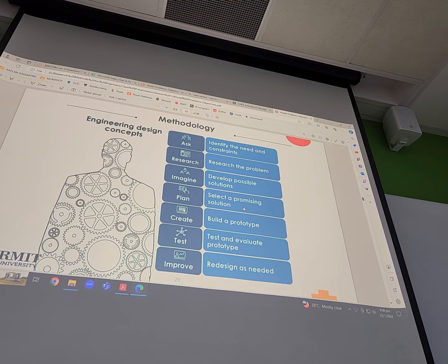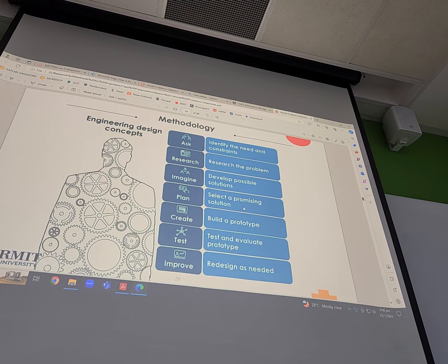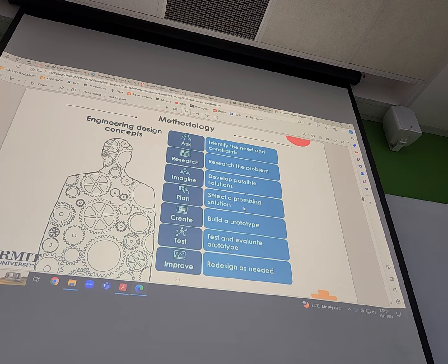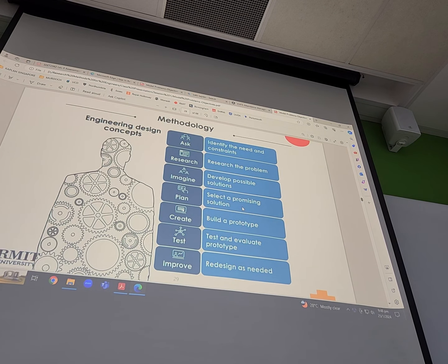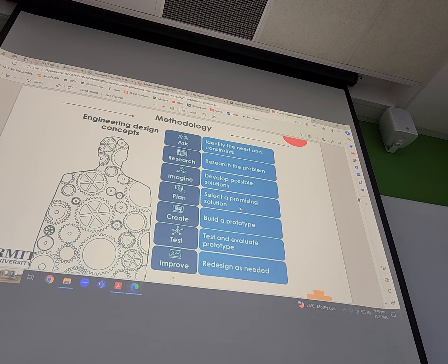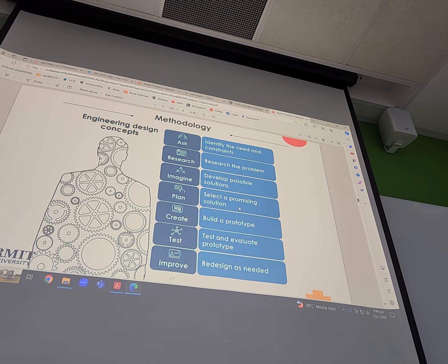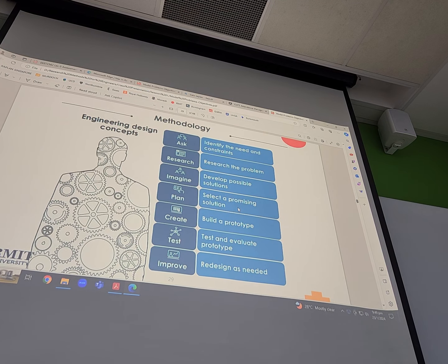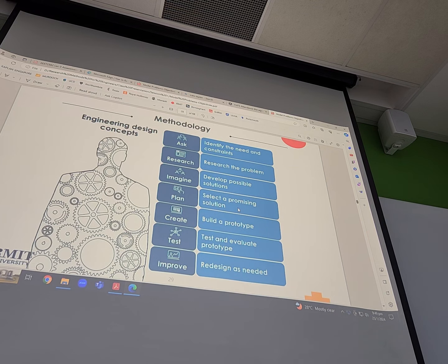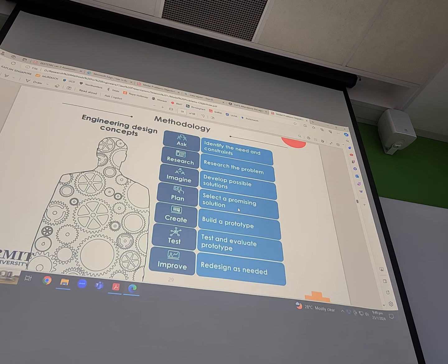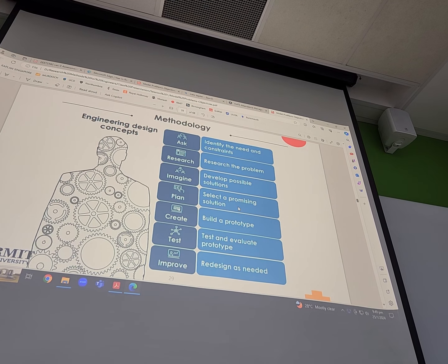What are the activities? One column. Different weeks, week 1 to week 13, one row. Identify how you match your activities with your time. This is known as a Gantt chart. You need to come out with Gantt charts for project A and project B. How many of you know Gantt charts? All of you, right? So you need to plan your activities.